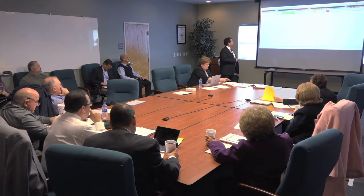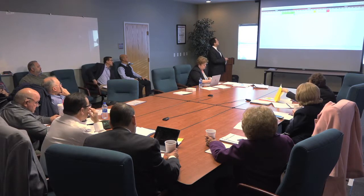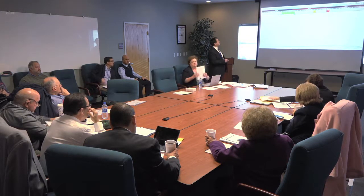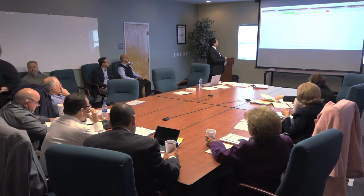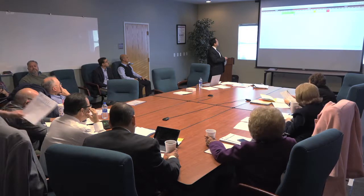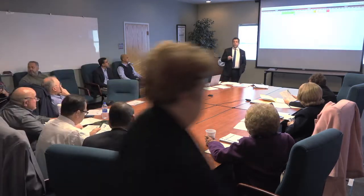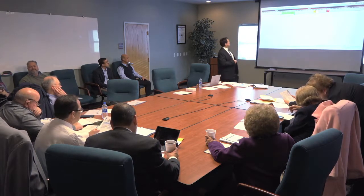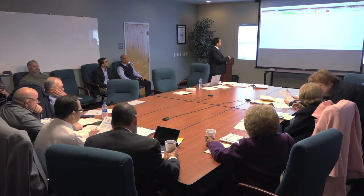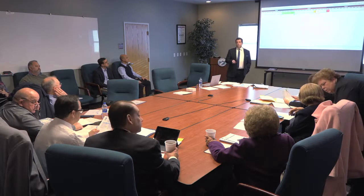Here also, when you look at the schedule, and I apologize again for that, I'll try to make those letters a little bigger. What you're looking at there is the spring semester, so it would be spring of 2020. You're looking at a move-in starting in mid-August. But now they already have a 20-day extension because, as you recall, there was a whole issue about the permit and getting the contract to get going with that. So with that being said, this is another one of those that would take us into the middle, actually end of September, and so we'd lose the fall semester.